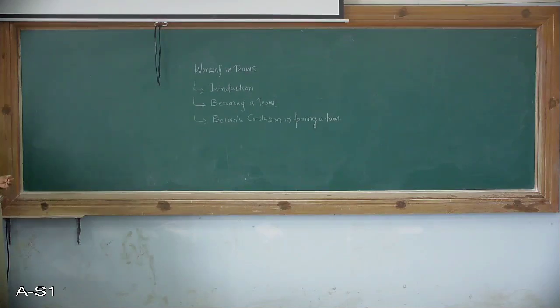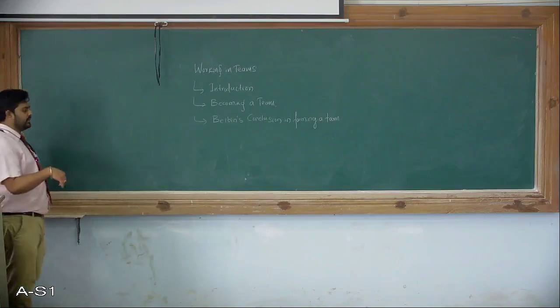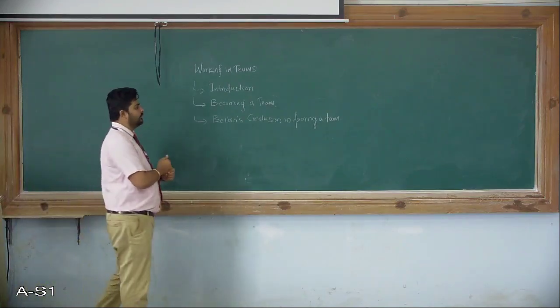Okay, the scope should be provided, the environment is to be provided, the tools and technology required are to be provided, and the financial aspect may be involved in that. So they need to identify the project infrastructure, then analyze the project characteristics. Decisions are made on how the project is to be executed, buying versus building the software functionality, which will affect the team structure needed, because here everything is dependent on the previous step.